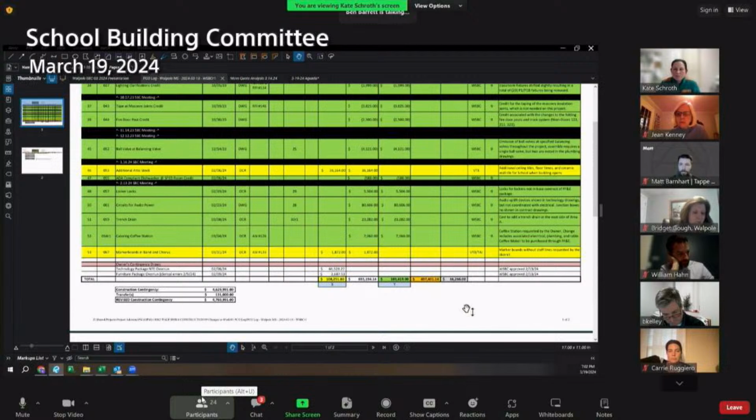So there's no claim mechanism to strike that cost and have somebody else pay it, because anybody who looks at that, if it was a claim situation, would say, well, it has to go in to make the building work. And as long as there's no additional cost being incurred, that's part of the cost of the building. And the only difference is we're paying it now instead of paying it at bid time. That's the only difference. So it wouldn't be viewed as an error. It would be viewed as an omission. And so the town is receiving the benefit of that work. And so we've got to pay for it, is how it breaks out.